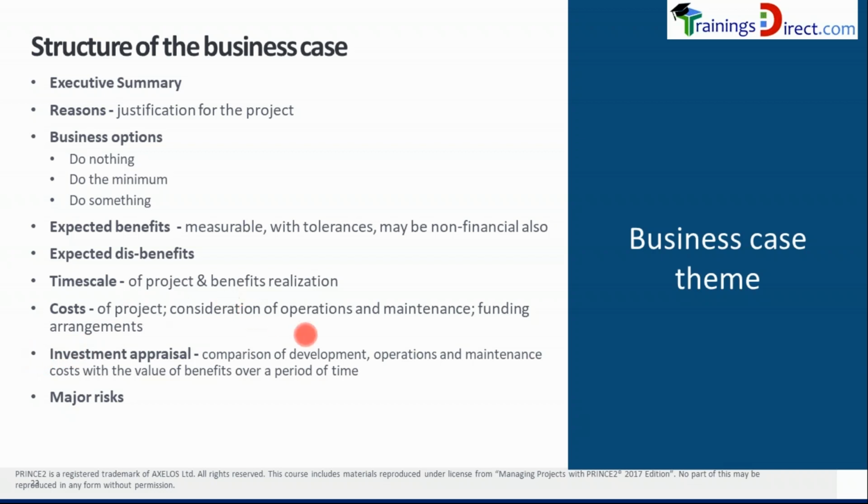Investment appraisal, meaning the comparison of development, operations, and maintenance costs with the value of benefits over a period of time, meaning there will be economic calculations which will check whether the investment will result in certain benefits or not in order to undertake the project. And finally, the major risks. There may be other sections, or these sections may be modified as part of project tailoring.